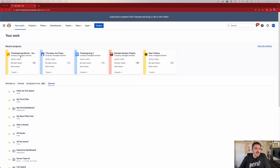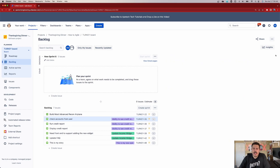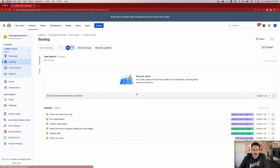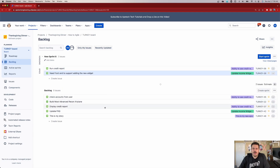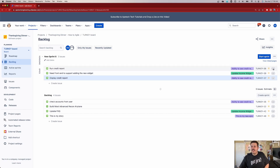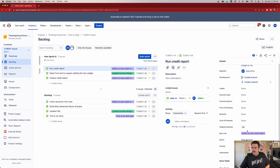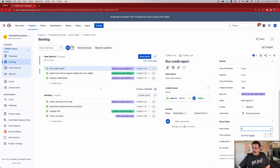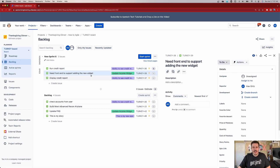Inside of Jira, I'm going to jump into a company managed software project. We are in our backlog and we are in the middle of planning out a sprint. When we go to plan our sprint and bring in our stories, I'll add a couple of them here. When I click to add story points using my story point field, I can put in a five here. Once you put in the story points, it'll show over here and give you the estimate down here.